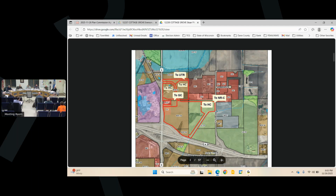Right? And the good news with this development, I don't know if it's good news for them, but it's a two-phase development. We're in the preliminary plat phase now, and rezoning, and they're just looking for general consent that they're on the right track. And Wade talks about how he spent a lot of money, and he's going to spend more because they have to go to final plat, where they have to refine the engineering, refine the stormwater, prepare construction drawings for the road, all that sort of stuff in great detail, and do all the legal stuff associated with what you're describing in particular. Okay. And that would all be with the final plat, along with the development agreement and other things that you guys would be involved with.